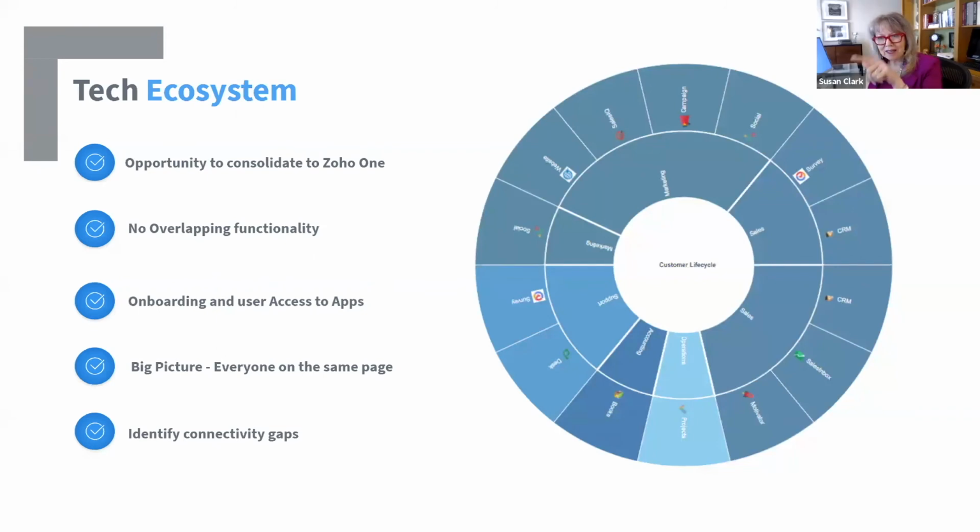John Mark, I like this wheel, but I think it doesn't set expectations very well. Because to me, it looks like you're going to implement everything. And so it's kind of like, oh yeah, here's the picture. And I'm wondering if a different kind of thing wouldn't be better, where you could put them in swim lanes, vertical, here's what we're doing and here's the time phasing.